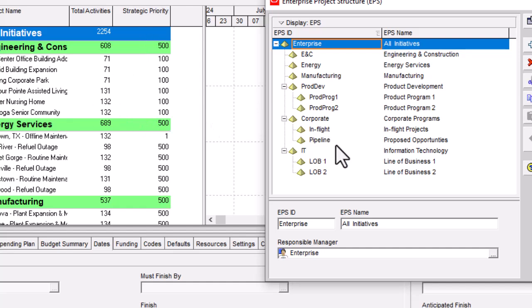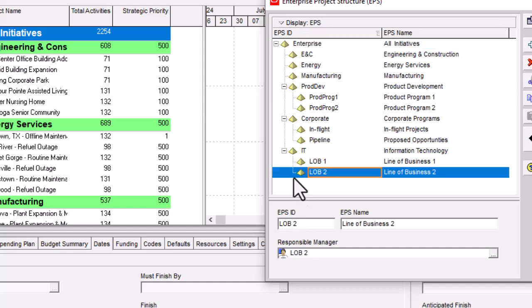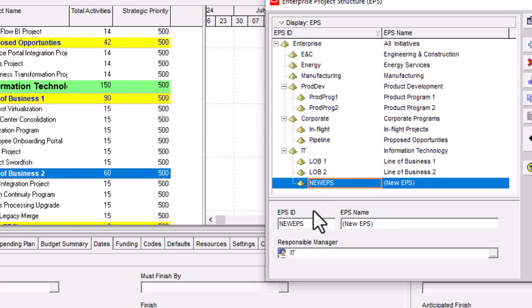Now how do we create a simple EPS? First of all, for example, I just wanted to create a simple EPS. I will simply click here and it is named New EPS. What I want to do is construct a house. For example, its ID is H and I gave it the name House Construction. Okay, so if I double click here, my EPS is now saved.